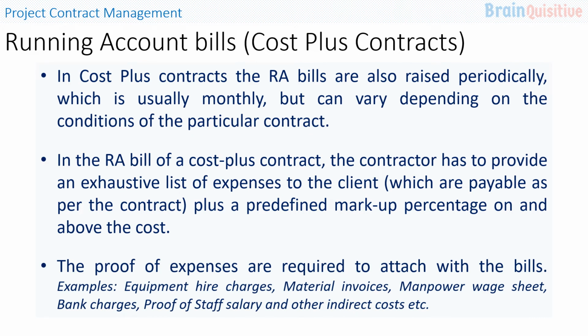The proof of expenses are required to attach with the bills. Examples: the equipment hire charges, the material invoices, manpower wage sheet, bank charges, proof of staff salary, and any other kind of indirect costs.